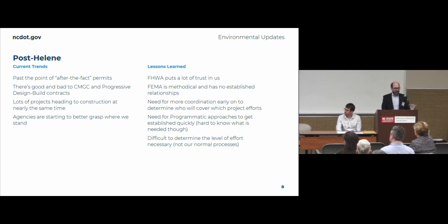So we're learning a lot about CMGC and progressive design build right now. Who all is involved in a CMGC or a progressive design build contract or project? Yeah, a lot of hands. So there's a lot of good and bad to it. It's great in that it gives us a chance to get out there and start rolling. It's a phased construction process essentially, so they're dealing with issuing work packages. The design and construction are happening at the same time.